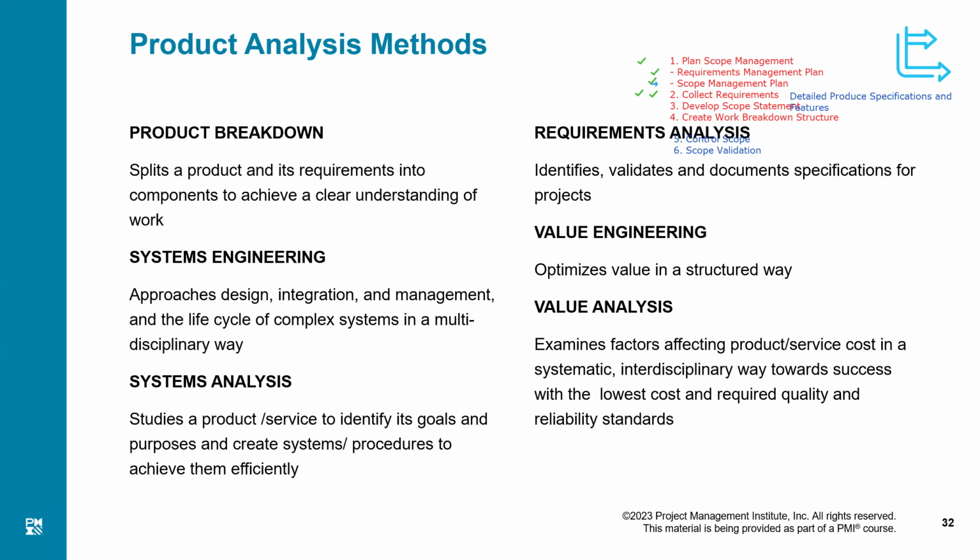That means if I give both of you the same project and I ask you to develop a work breakdown structure, it is highly likely that your work breakdown structures are poles apart. And I don't mind, because both of you may be right. One may be working from a product perspective, the other from a project perspective. But the only consideration is that both of you must end up with work at the end. At the bottom of the breakdown structure, you must have work, right?